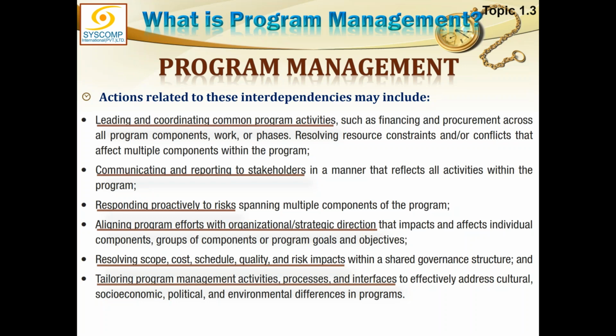So if the construction job is to be done in all the projects of the program, then maybe the building material could be procured centrally by the program. So procurement across all the program components, work or phases could be taken up by the program activities. And resolving any resource constraint, that is the biggest issue.